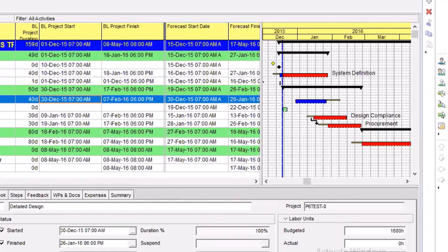So you have future delays here. Even if it has not gotten to that date, you are seeing future delays here. You're seeing future delays on the critical part already. That is where you start shouting alarm. Please, we need to correct this problem here because there is a future delay.